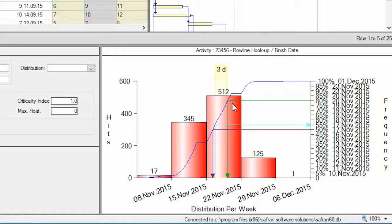The risk histogram can show the spread of start dates, the spread of finish dates, the durations and float.